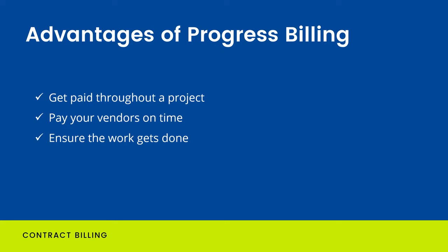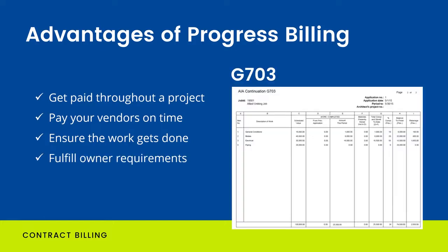And on those contracts, it's mandatory that you submit your billings in AIA G702 and G703 formats in order to get paid. Many of you already are familiar with this concept, I'm sure, and this is once again something you cannot do in QuickBooks. In my experience, to be honest, AIA billing requirements are the number one reason most contractors using QuickBooks begin looking for other software solutions.